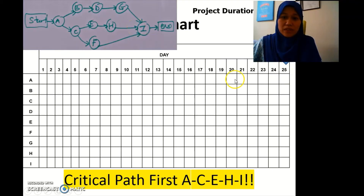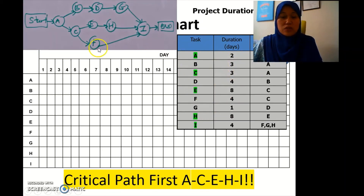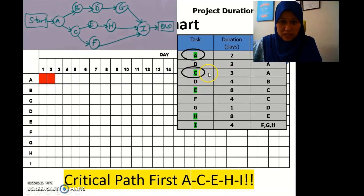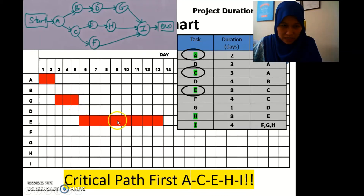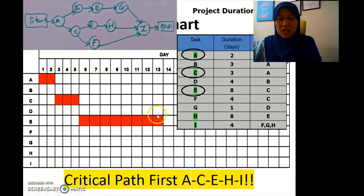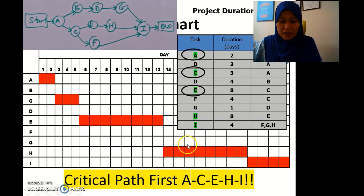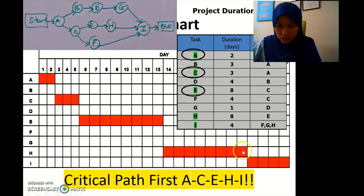First we put in the critical path: A, C, E, H, and I. A has duration 2, so A covers days 1–2. Then C has duration 3, covering days 3–5. Then E, and we mark until day 8 — one through seven and eight. Then H is next, and finally I with duration 4, completing the critical path.